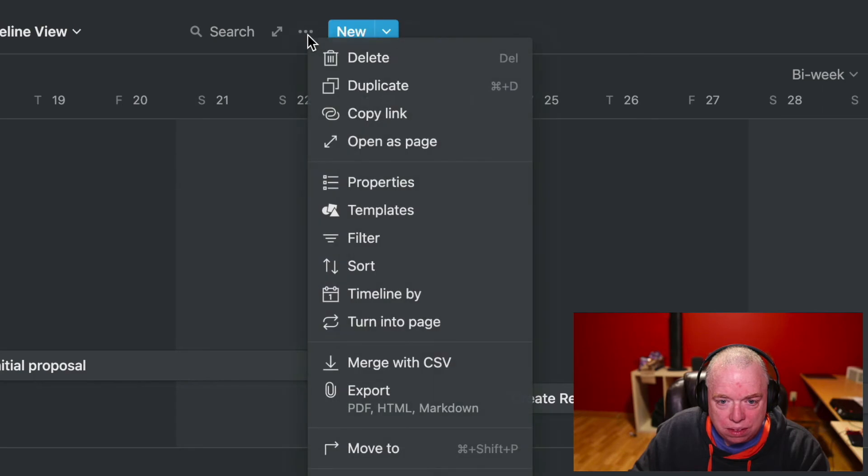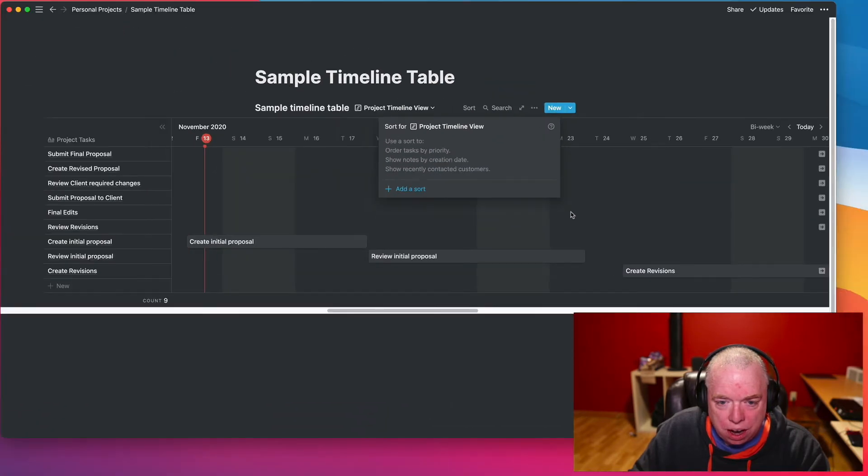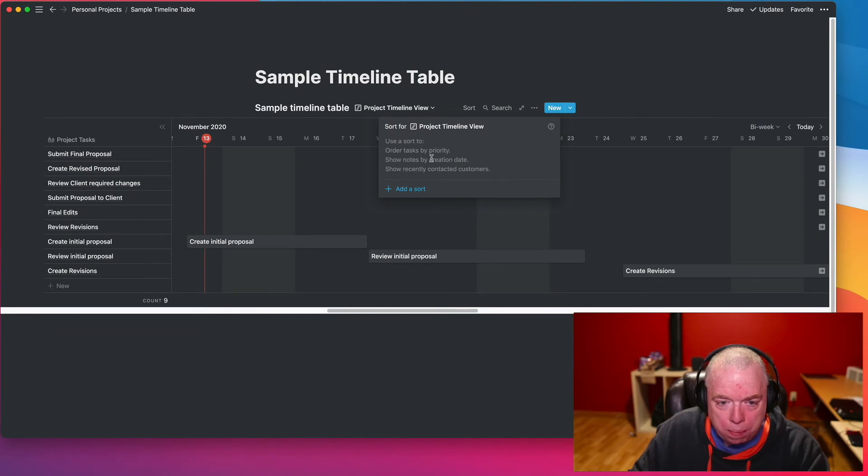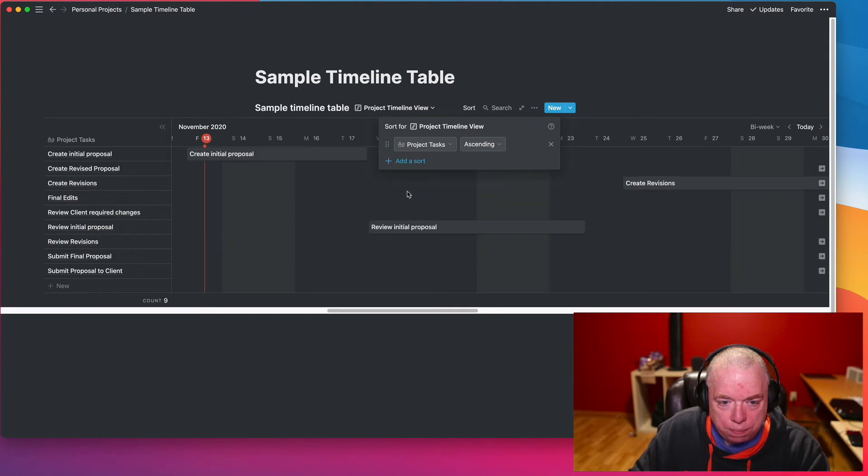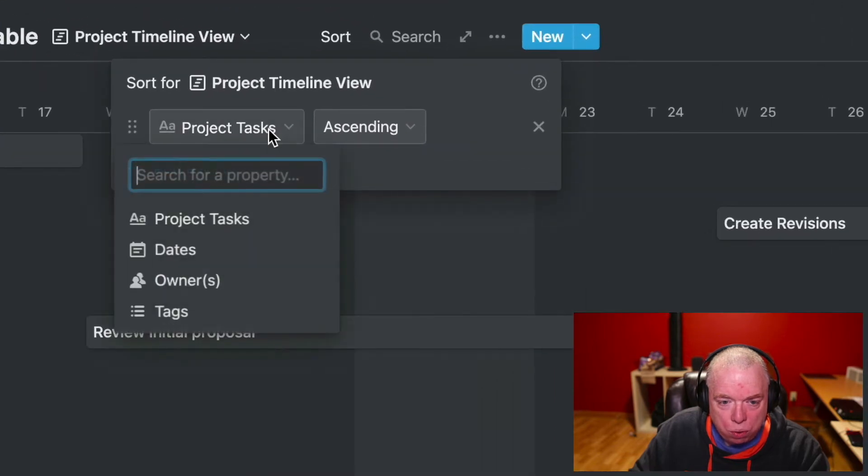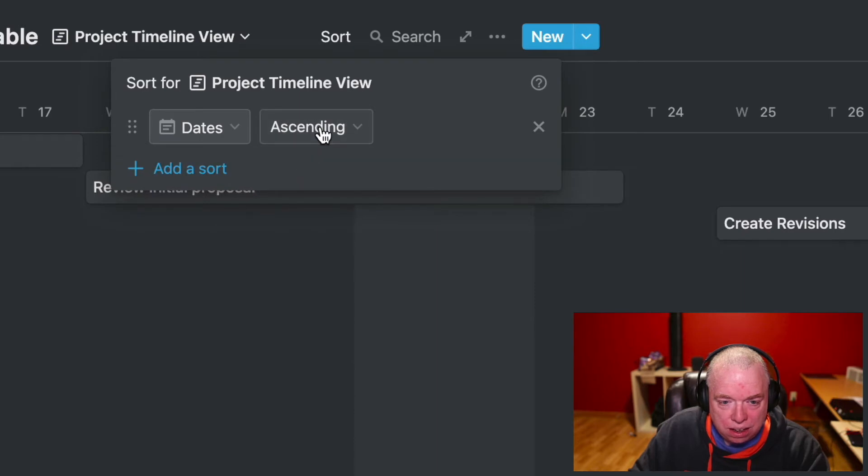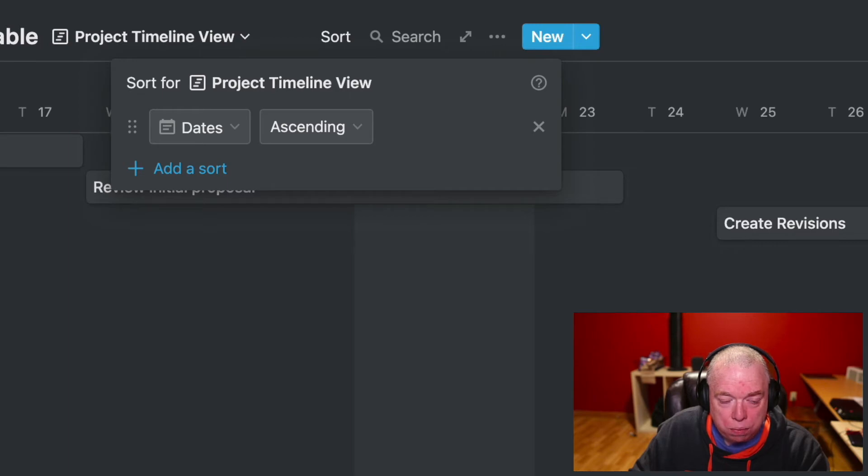So the easiest way to fix that is to come up here to the ellipses, click it, and come down here to sort. Now, once you click sort, you're going to bring up the sorting dialog box, and you'll be able to add a sort. And then what you want to do is go to your dates and ascending. It'll start from the top with the earliest thing, and then each task underneath it will be the subsequent thing from a time perspective.